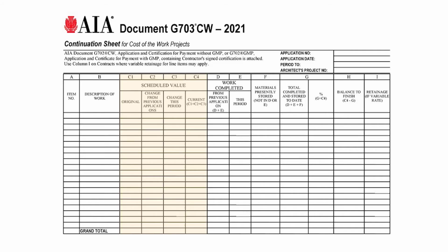Well, Mike, if I can just clarify one thing with regard to what we call the little c contingency. The little c contingency is intended to be for costs that are allowable under the agreement and defined as costs to be reimbursed. It includes costs during the correction period that the CM or the contractor may incur that aren't the result of the contractor's negligence or failure to perform their obligations in accordance with the contract, which were sometimes called bent nails. The little c contingency is not intended under the AIA documents to be a slush fund for the contractor or CM to use for coordination errors or excessive overruns and that type of thing. It is not intended for that purpose. It's only to be used for the allowable costs of the work.